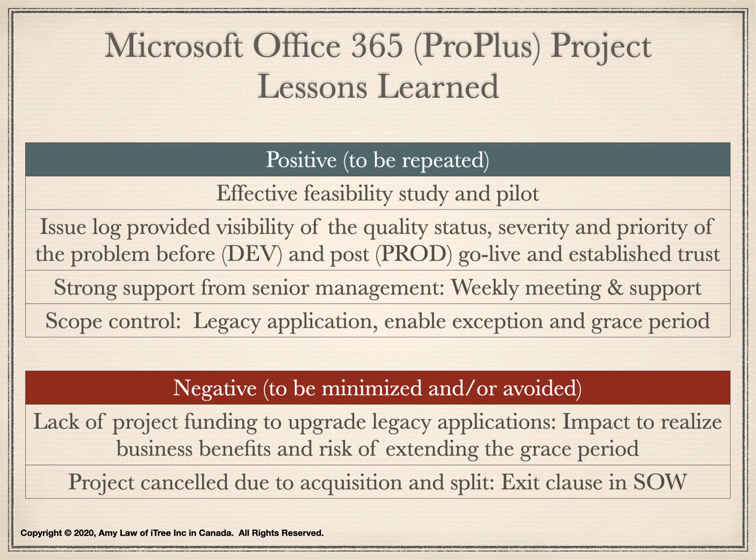It also provided the severity and priority of the issues before and post go live in the development and production environment. More importantly, the issue log had a date time stamp about the action taken from the day when the issue was reported. When a sponsor asked for the status of an issue, we could quickly look it up from the issue log. This established trust, reliability, and proper attention to the quality of the product.